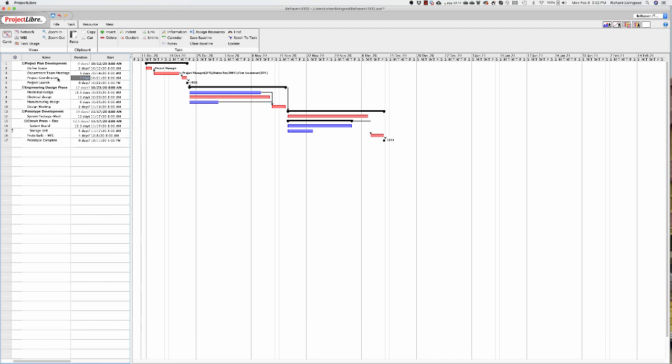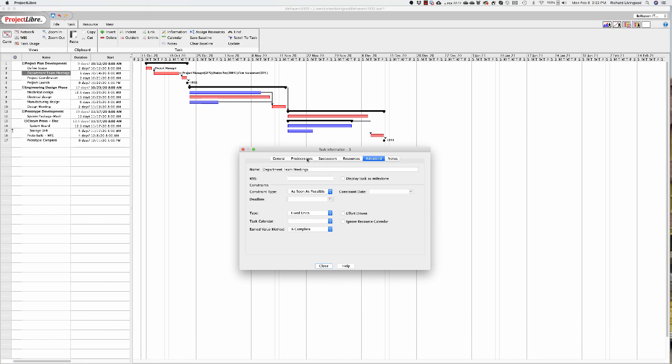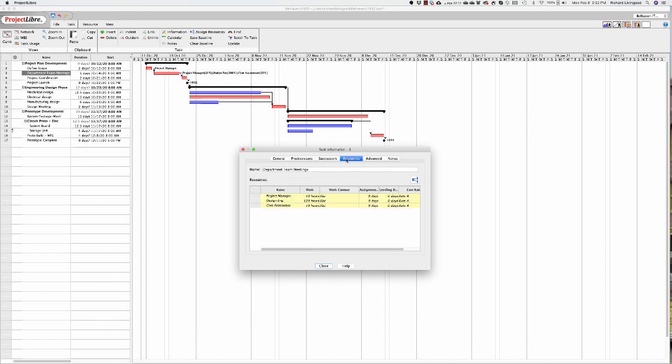There we go, now we're right. So now, notice, if we go back, and I'll go through this in a moment again, the resources are changed because the way the system does this by default, if you assign 3 people to a task of a certain number of time, let's say 5 days, but we assign 3, it says, oh, you can do the work in a shorter time. Well, we said we couldn't do that.